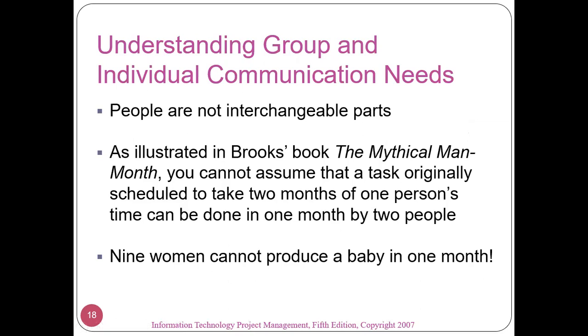So people are not interchangeable parts. Of course, we need to know that. Because many top managers think they can just add more people to a project that is falling behind schedule. Unfortunately, this approach often causes more setbacks because of the increased complexity of communications.